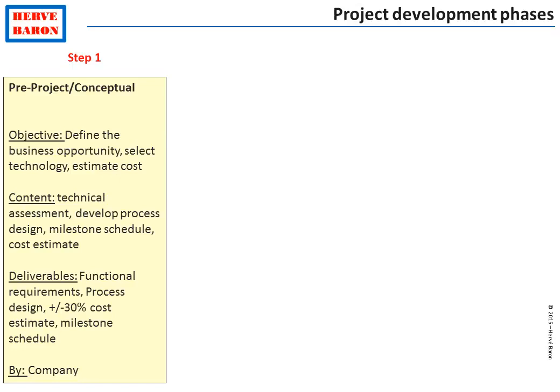This step 1 is sanctioned by a decision to go forward into step 2 or not. Since step 2, which will be further refining, for instance, the technical feasibility of the project, will involve a significant amount of expense, at the end of step 1 there is a gate where the decision is taken, based on the assessed attractiveness of the project, whether to proceed to step 2 or not.